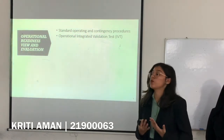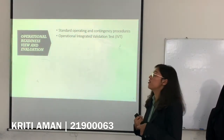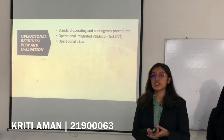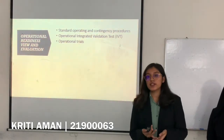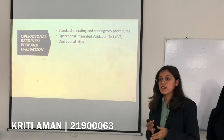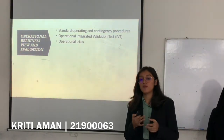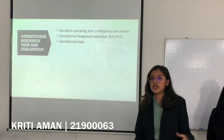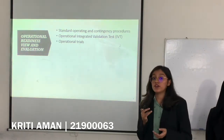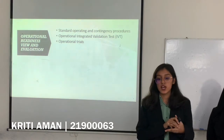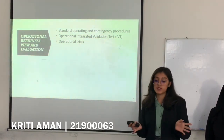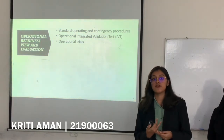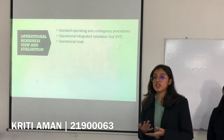The airport is also required to conduct the Operational Integrated Validation Test, or IVT. IVT focuses on the airside aspect of the airport and is a set of 14 tests that need to be taken to validate operational procedures and ensure the airport is ready for its opening day. The trials involve the whole airport community as well as mock passengers, who are randomly chosen from a given sample survey and placed under a simulated airport environment to challenge them against different procedures and new facilities being added.